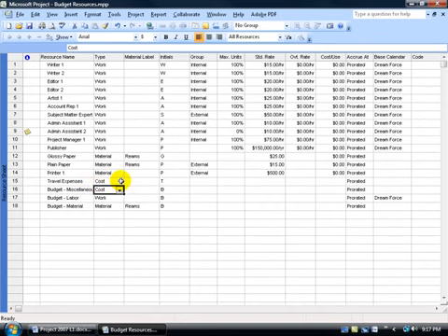If you go over $2,000, I want you to know if you go over any one of these budgets in Project, there's not going to be a red flag. The whole purpose of your budget is to do comparison, to say, look, I set $2,000 aside for the budget of the cost. You're going to compare that in another view against your actual cost. Say, wow, we're at $2,200 and it says $2,000. I guess we're toast. I better call somebody and get more funding. That's all you're basically doing.